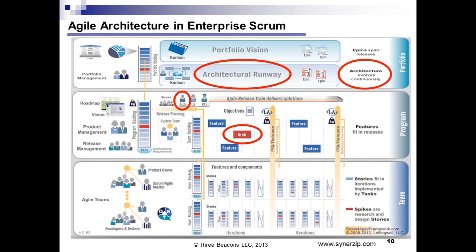So that's an example of a portfolio epic, which is going to have several features, and each of those features is going to have multiple user stories. The architectural runway covers the grander things. This is where we would define things to move our architecture over. I'm just making something up here: maybe we're Linux-based right now, and we really need to be .NET. So you have an architectural epic describing that. And of course, the bigger the epic, the longer the runway, because it's going to involve more. Another one might be some structural change in the software that would help reduce maintenance costs.